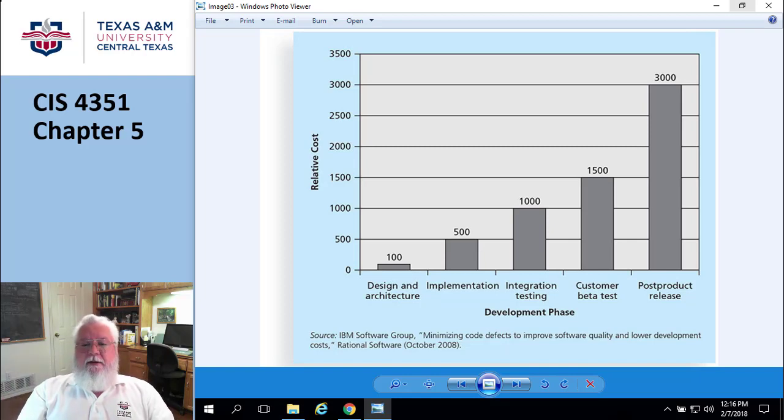Okay. Observations. Now, a good technique is direct observation. In other words, how long does it take to fill out this goofy form? And somebody will say, wow, I don't know, it just takes me 15 seconds. And then you go, really? Okay. So you might really want to just watch and see how long it really takes, because maybe it takes a lot longer than that, and they're just kind of bullshitting you.